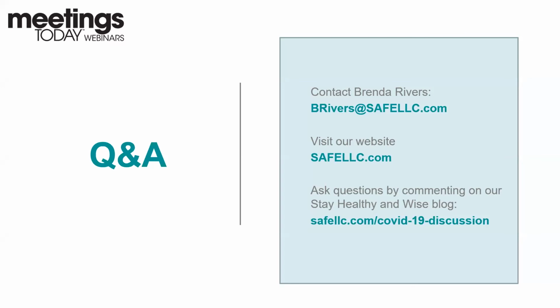And when we start to see these things happening with the state of the pandemic, what is that going to signal that we need to do with this event? And I mean, I hate to say it, but if you can't get the hotel and the vendors, the speakers, maybe you put in their contract that if they choose to cancel under these circumstances, then they have to be willing to do their presentation virtually. That's a good point.